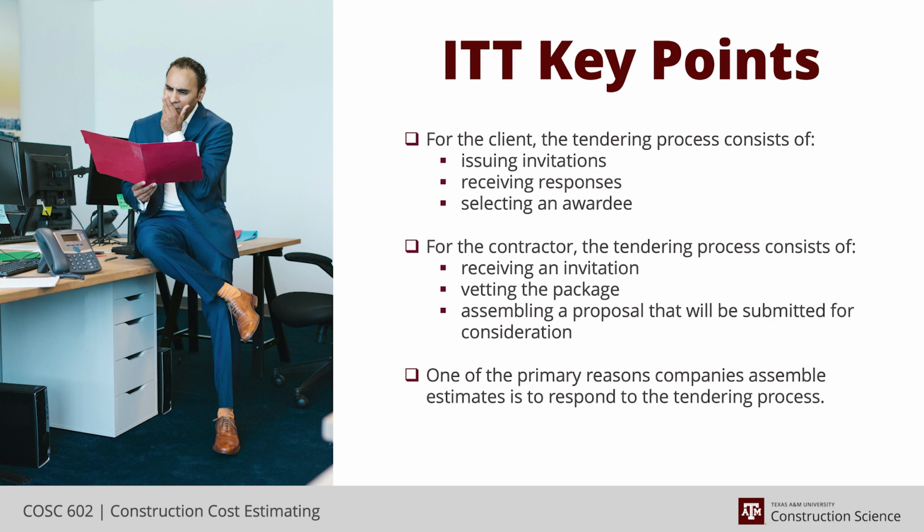And then the award, even on some of the $5 million jobs that I've been involved in, it takes weeks for them to make a selection as they go through and analyze the qualifications as well as the price and the schedule and the execution plans that you've written up. I've seen large jobs take well over a month.